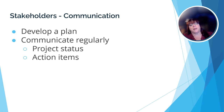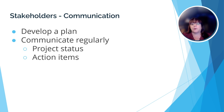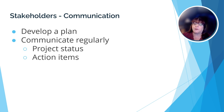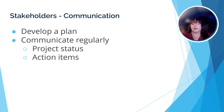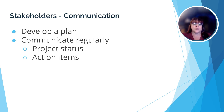The last piece of the stakeholder puzzle is communication. The project team must develop a plan for how they will communicate the progress of the project to the identified stakeholders. Each stakeholder may have a preferred method of communication — maybe they only want a weekly report sent by email, maybe they want to be included in project team meetings, or maybe they want a formal presentation.